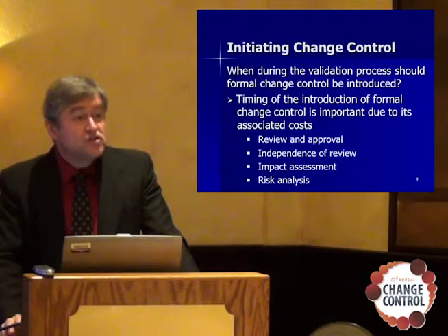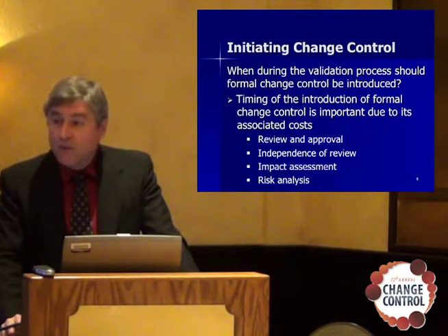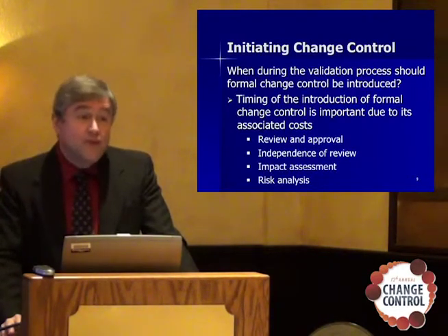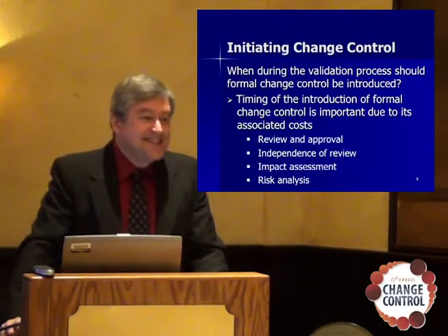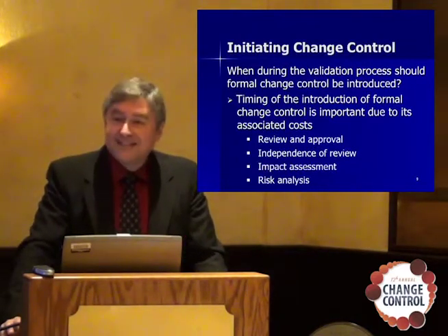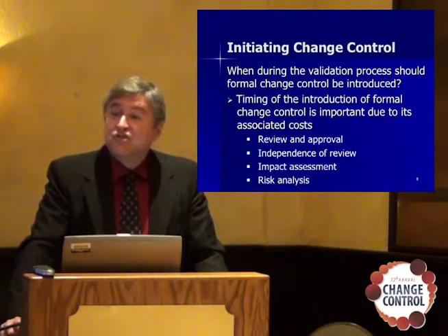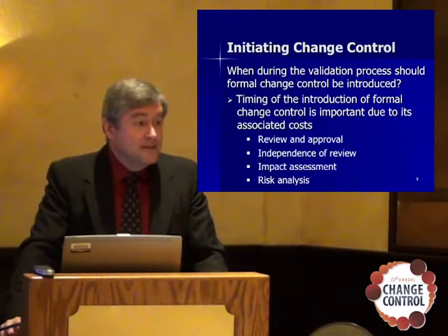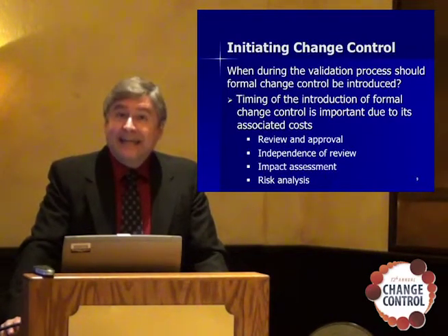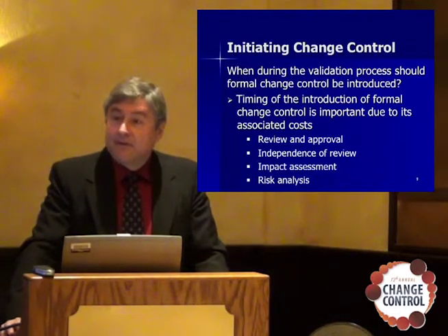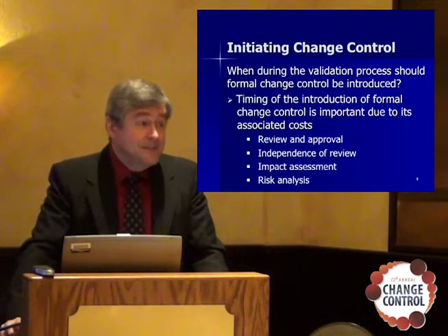There are costs associated with formal change control. Here are some of them. There's review and approval. That takes time, sometimes lots of time. It can really slow down a project. And it can really inhibit a project from being nimble at a time when it needs to be nimble.